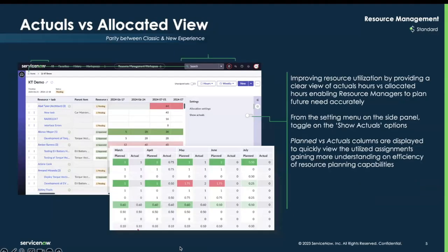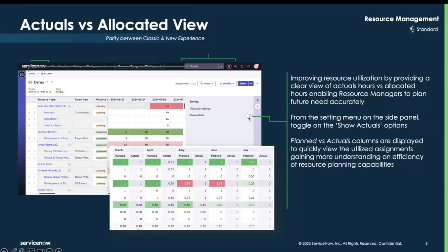The next update is the Actuals versus Allocated view. A new toggle in the side panel settings now enables users to compare actuals versus allocated for a resource's time. This helps resource managers get clear insights into resources and their actual usage and utilization. Within the resource management workspace, move to the settings menu on the side panel and toggle on Show Actuals. Once you hit Show Actuals, that provides two columns — one with planned hours and another with actual hours.